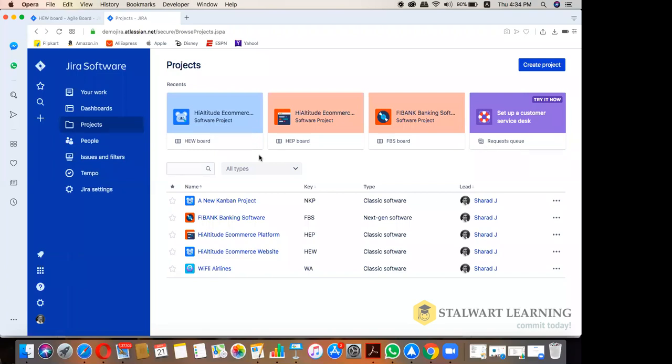Each team can have its own backlog. Each team can have its own project. I would recommend that for your Scrum teams. The way it is done is that each product, each service has its own backlog, has its own project in Jira. So that's the way. But if you want to do that, use a label for distinguishing between Scrum teams. You can do that. Why not?